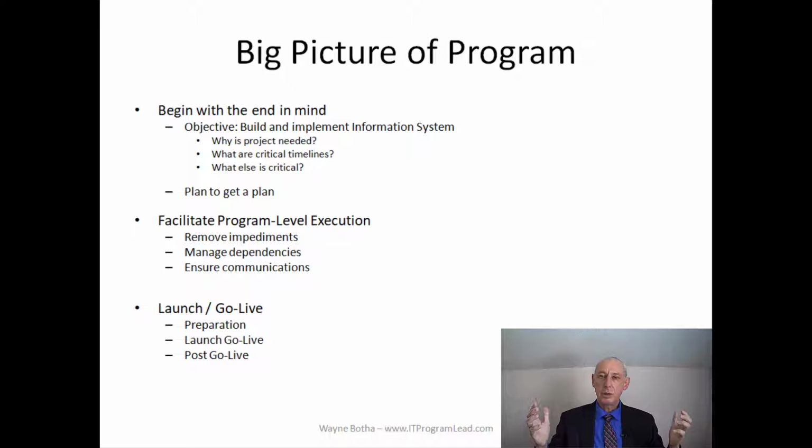Now, on a large program, usually you do not know everything about the program at the start of the program, and so you need a plan to get to the final project plan. So you might need to call an off-site for your leads to get together and help uncover the information that you need in order to develop that multi-year program. And then of course you need to facilitate the program as it goes through the steps, through its life cycle, removing impediments, managing dependencies, ensuring communications take place.